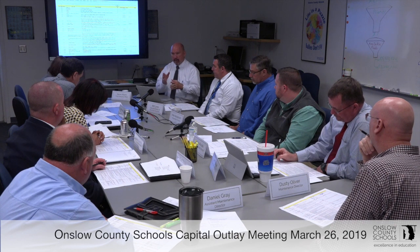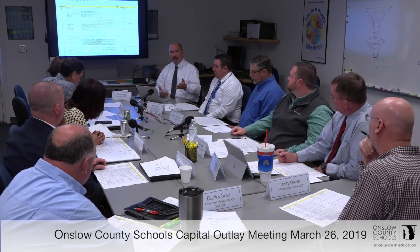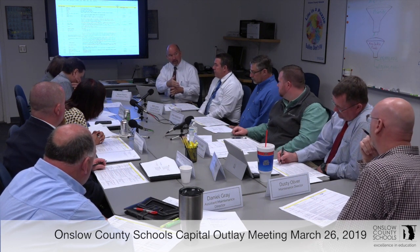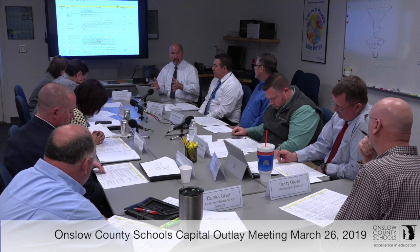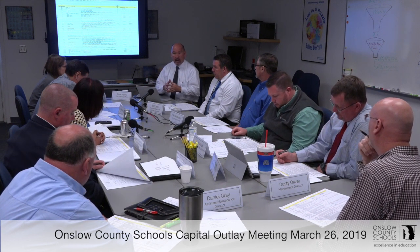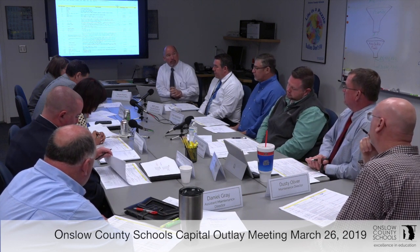If you can imagine, there's probably quite a bit of deferred maintenance that builds from year to year. For example, we have identified in the capital improvement plan this year about $7.9 million worth of facility needs, not transportation, technology, safety, security, or instructional needs, just facility needs. We probably won't get that, so some of this gets deferred into deferred maintenance, and we'll go back and address it again next year. What happens finally is you just hit the hottest spots and address the things you have to have immediately in this deferred maintenance process.